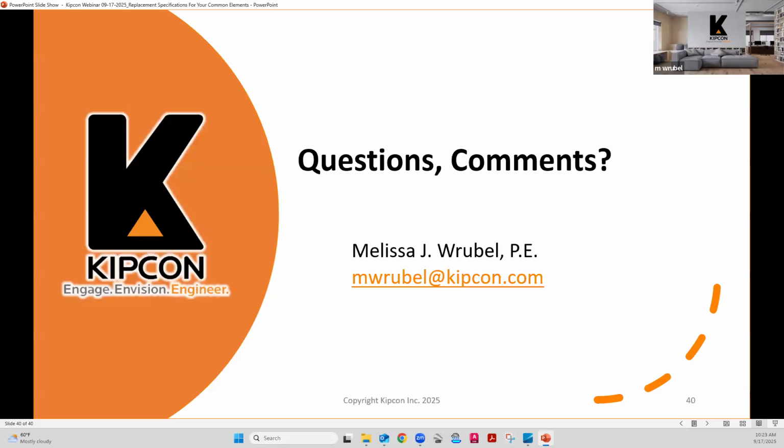So in terms of what needs to be done, when we're putting together specifications, I always put in our proposal that once the specifications are complete, before we ever go out to bid, I will meet with the association to go over the scope of work.